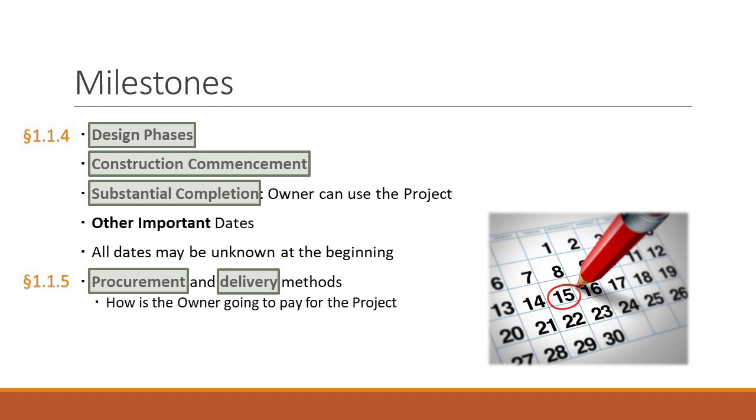So you can rent out floors 24 through 30, because those are the highest paying rents, because they'll have the best views. You want the contractor to finish those first. And so there may be certain dates tied to those, or what's called liquidated damages and other stuff. So you want to have those dates in the contract for people to understand. So that's the additional information.